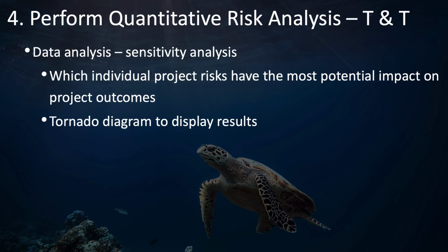Once you've run thousands of scenarios through this simulator, you can then figure out which project risks have the most impact on your project outcomes. And then you can take those most important project risks and display them on a tornado diagram.